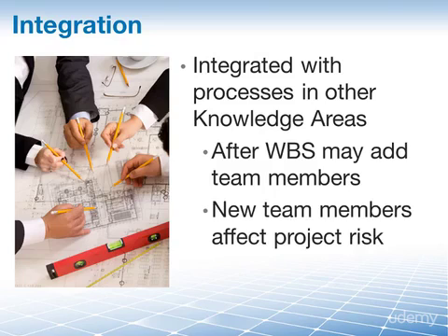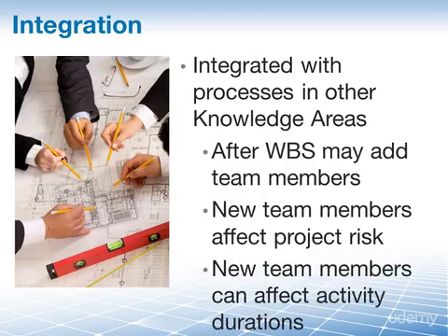Or anytime you add or remove team members, there is project risk, possibly positive risk due to the new skill set that the new resources bring onto the team and how they work well with the team, or negative in the case of someone lacking the needed skill set or being toxic to the project environment. Or, for one more example, think about how new or changed resources could impact activity durations or cost. If they're really good, things will go much faster, but if they're a bit lacking, they may drag you back and things take longer and cost more.